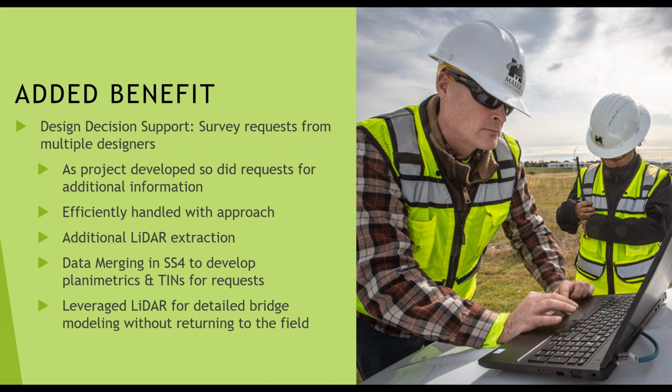Collecting in the way we did, we had so much additional data in different areas that were not required in the original scope when they came back with change orders and said, hey, we need this, or we need that. We were able to just take the original LIDAR data set that was already registered, locked down to control, and do that final extraction for them to get those added requests done efficiently and cost effectively without having to return to the field. Data merging in SS4 to develop planimetrics and TINs for requests. We also were able to leverage the LIDAR data for detailed bridge modeling without having to return to the field. Anyone that works in the field knows that sending crews to the field can be one of your biggest cost points.